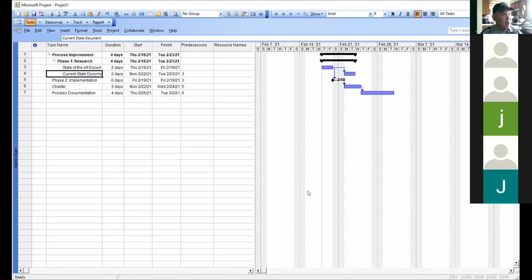Okay, so here we go for this one. Remember, this is now 1.2. This was 1.1. This is 1.2. What is this going to be? 1.2.1. This one will be 1.2.2. So I'm going to indent twice here.